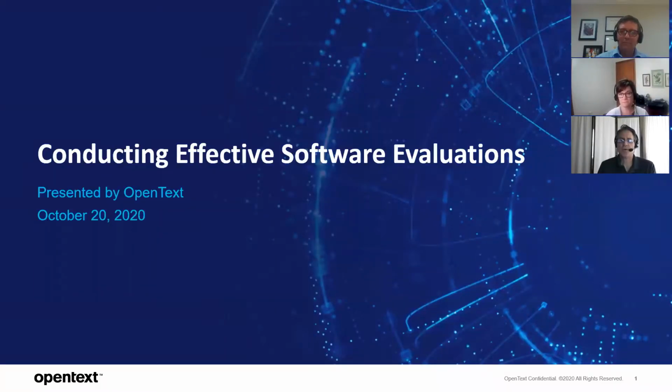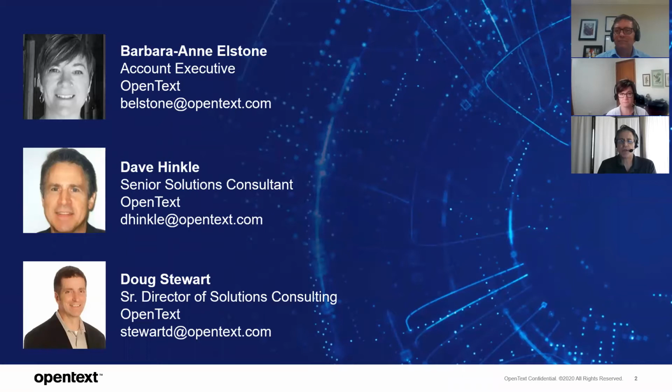And so, that's kind of the one warning that I can think of: don't try to introduce those midway through the POC, because most of the time those POC environments aren't architected or designed for it. They're designed to be as minimal as possible, to try to shorten the timeline to be able to get through the functional requirements.